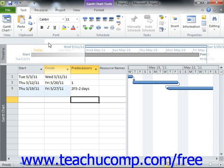You can enter either a specific value, or you can enter the value as a percentage of the task. For example, entering 2-50% for task 3 would give you a 50% lead time based on the duration of task 2.